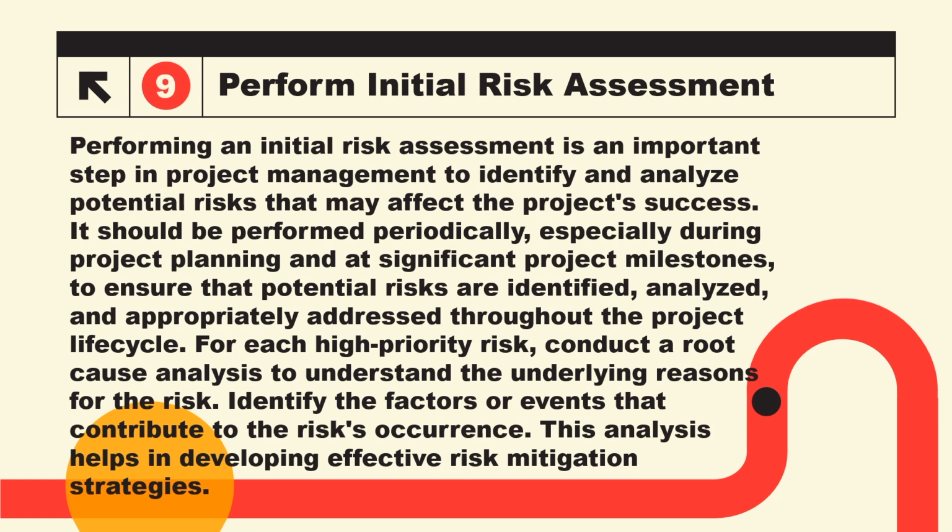For each high priority risk, conduct a root cause analysis to understand the underlying reasons for the risk. Identify the risk factors or events that contribute to the risk's occurrence. This analysis helps in developing effective risk mitigation strategies.